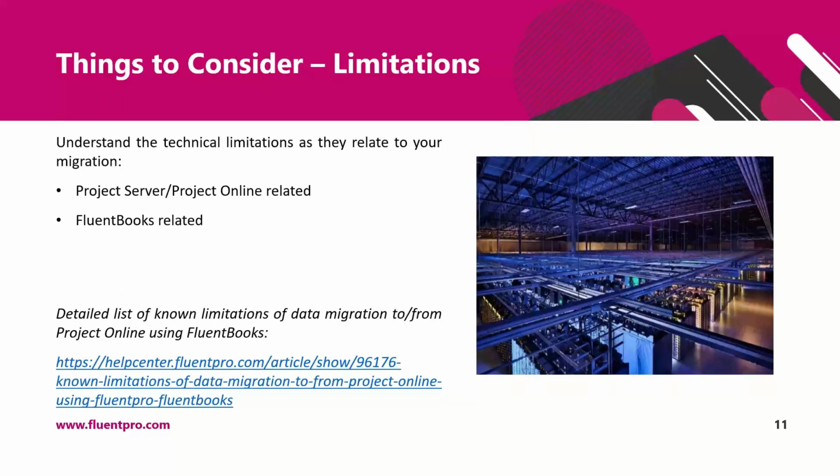So when doing a self-service migration, it is important to understand the technical limits of Project Online or Project Server and the migration tool as they relate to your migration. This has to do with the concept of throttling, for example, within Project Online, how much data can be uploaded at once. In addition, there are some technical limits with regards to what can actually be migrated. These limitations come from limitations of APIs used by FluentBooks to download and upload the data.